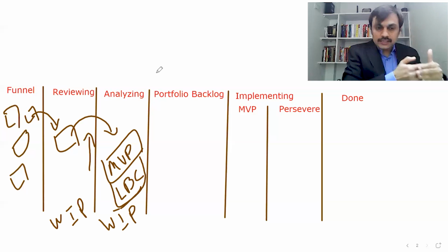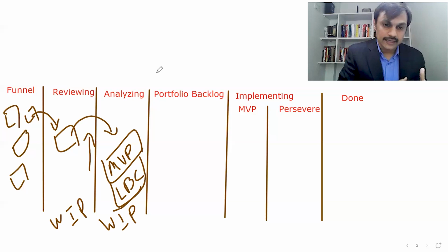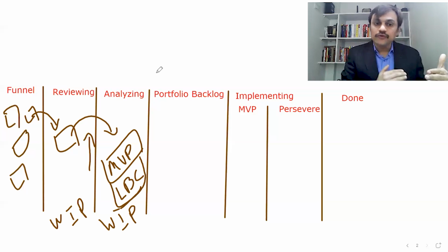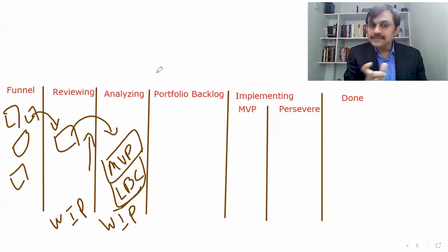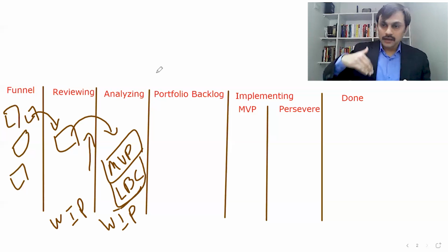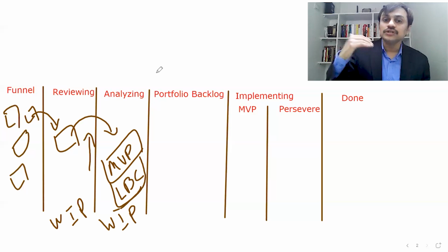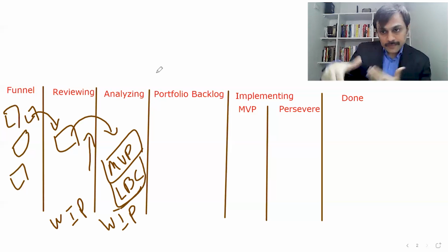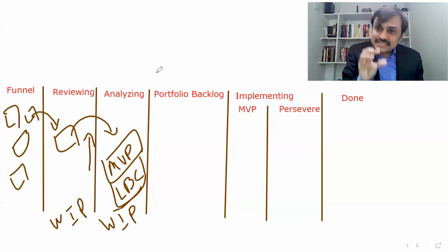So epics will have their assumptions related to the returns, and those assumptions, especially if you are in a very new area, need to be validated before we invest more or implement the whole epic. And that portion will help us identify whether we are going in the right direction with the help of some concrete data. It's not that stakeholders in a review are saying, yes, we are going right, but something which we put in front of customers, and we get feedback from that space, which helps us identify whether we are going right or wrong. So that piece has to be identified.